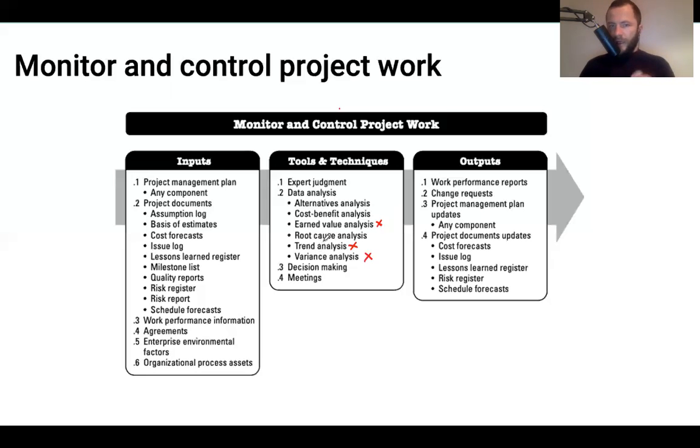process. And for outputs of this process, once you monitor and control project work, we will produce work performance reports, requests to change project configuration. Let's say the project management plan might be updated as a result of this, and documents might be updated. Essentially,